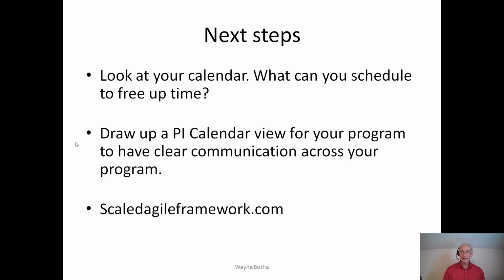If you don't already have a PI calendar view for your program, then go ahead and create one. It helps to communicate with all your stakeholders and also across the program. And surprisingly, once you put all your ceremonies into a single view, you'll see if there's overlap or discrepancies. For example, if people are required to attend two meetings at the same time.